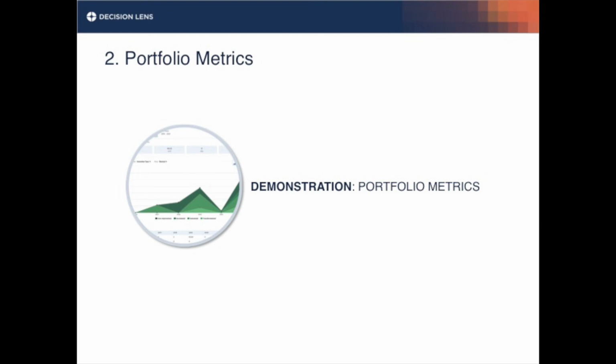After the second round of trials, the data that came in showed that it was 3 times as effective as they thought it was going to be, which was great news to everyone. When they added that effectiveness to their criteria and re-looked at their stacked set of product options, this product was now twice as valuable as one of the drugs listed above it that was getting more funding.